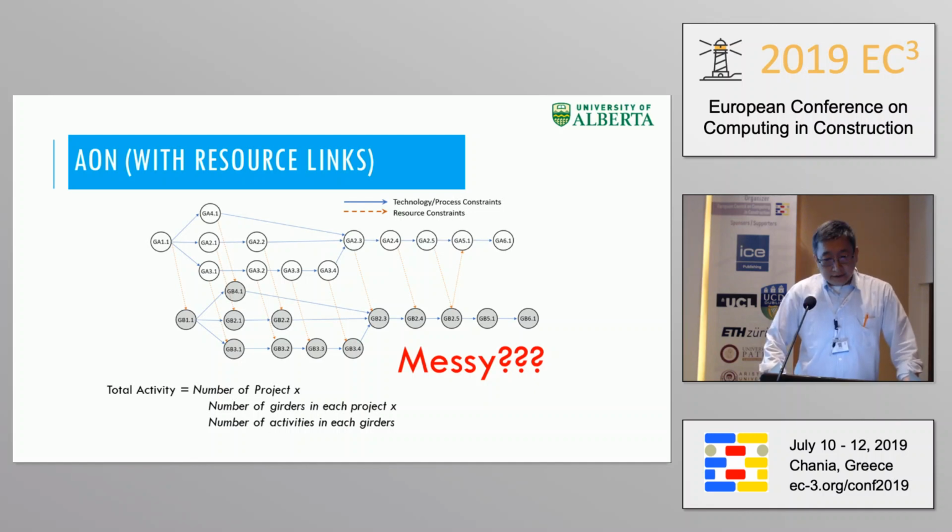Here is an illustration of the detail complexity. The total number of activities in your AON network, in your P6 model, could be tens of thousands very quickly, and the relationships between them in the network could be even more, hundreds of thousands.